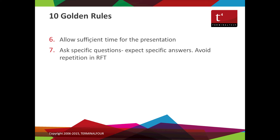The seventh: ask specific questions and get specific answers in the RFP, and avoid repetition — hopefully our sample RFP is helpful. The eighth: use existing purchasing frameworks. Vendors should have a good idea of what frameworks you might be able to use. Even if your own purchasing team doesn't know, vendors might be able to share that information. For example, in England the G-Cloud arrangement — purchasing departments might not be fully aware of what's available. Have that conversation with vendors, because if it speeds up your evaluation, that's good for you overall.